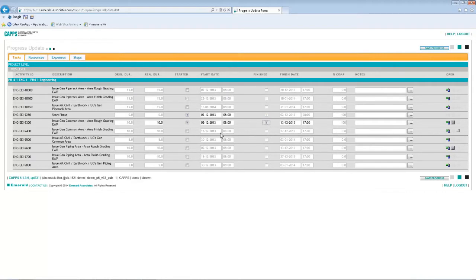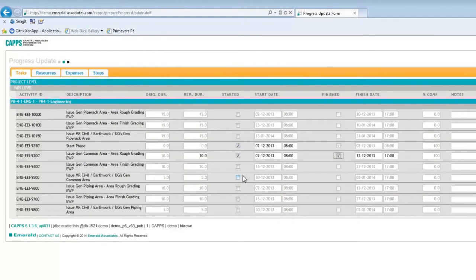And I will update one more task, 9400, and this task is still in progress, so I need to start the task, and then I need to update the remaining duration, which is two days.